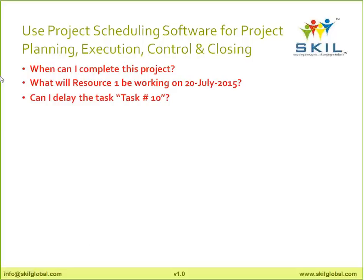Software helps you during execution and control. If someone says the client hasn't reverted on approvals and asks 'Can I delay task 10?', I look at my schedule. If that task is on the critical path, I must escalate: if it delays, the project gets delayed, and I issue a change request for a new project completion baseline. Can I approve leave for Resource 2? I look at the critical path — if he's on it, I can't give three weeks, so I need a replacement or to juggle resources. With software in hand, these questions become answerable.